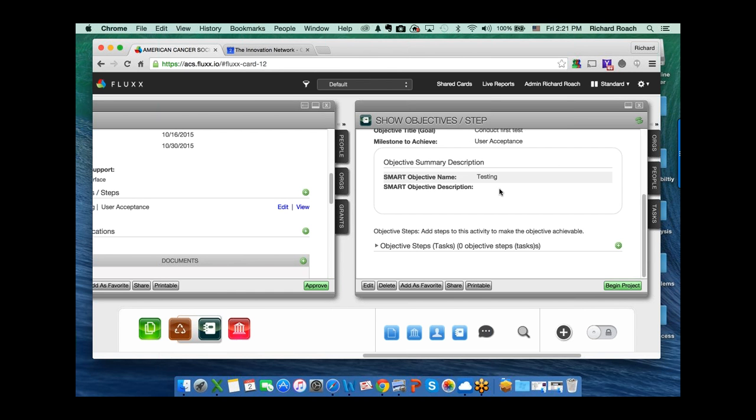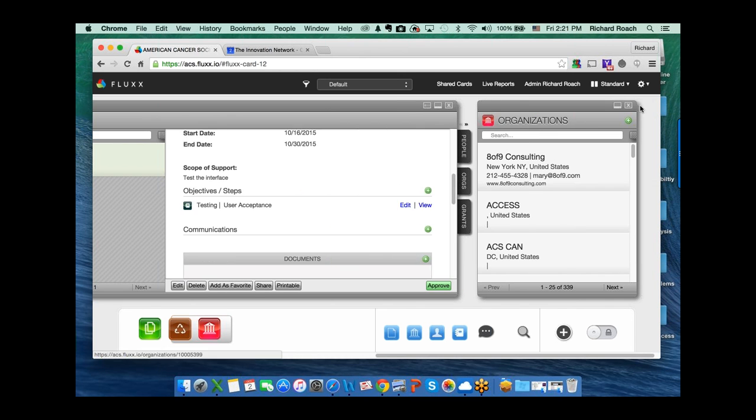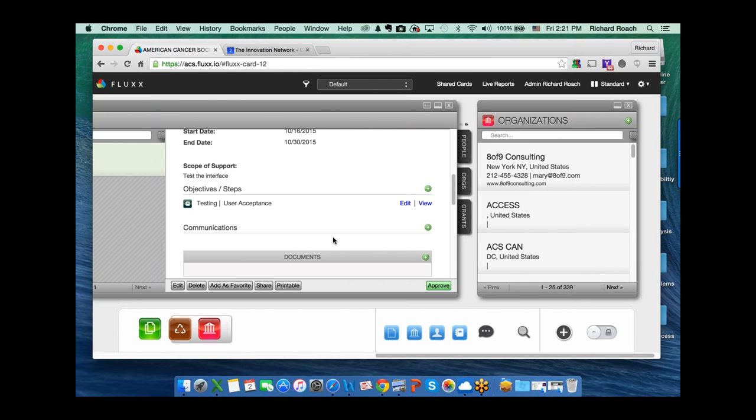And on the flip side, once the subawards are executed, there might be certain things we want to build in to monitor that subaward. Just like we have to give deliverables or reports to our sponsors, the subawardees have to submit information to us, so we may want to outline the report deliverable dates. So we want to add milestone reports to subawards. Right, that's one of the things I'm thinking about. Correct, milestone deliverables.